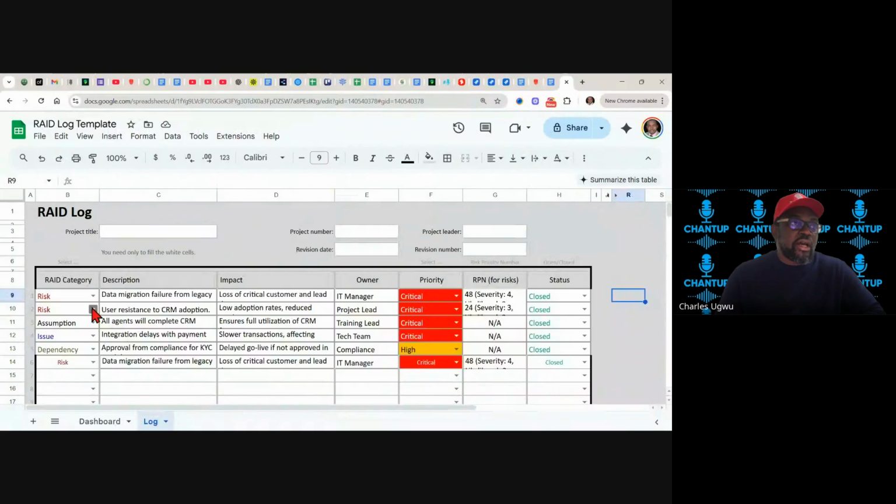Even 1 month ahead, you evaluate and find out there are so many delays. You already capture it as a risk to find a way. And within that time, you start asking, how do I close this? How do I complete this project within 3 months? You say, okay, I know what to do. Maybe you have a contingency fund. This is the time for you to go to the contingency fund and start pulling it out.